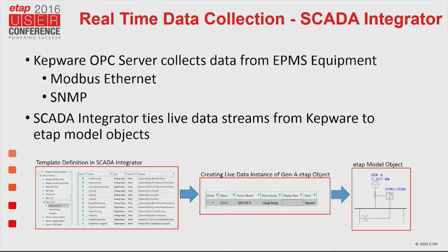Now, ETAP already has an OPC interface. They also have a Modbus interface. I didn't talk much about the timing of this whole thing. We got an order in November, and they wanted it commissioned and the keys turned over to them March 1st. They had all that time building this thing, ripping the building apart, but it's on a checklist for these general contractors as to when you bring in these specific systems. So it wasn't until about 3 months before it was due that they sent out the order to get this thing rolling, and they don't give us a lot of time to get these put into place.